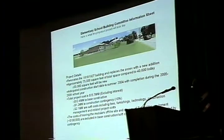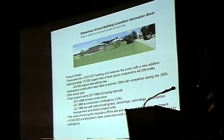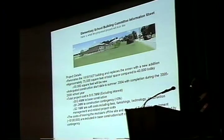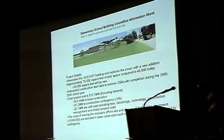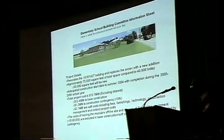equipment and fixtures and lights and windows that they think we'll use in this building. At this point, we haven't specified the exact windows or doors that we actually would use. And so they provide a little bit of allowance that allows you to tailor the building to the specific issues and needs of the community. So that $600,000 of design allowance, again, standard at this phase of construction, is included in the $12.4 million of base construction. Last part to talk about are these soft costs.